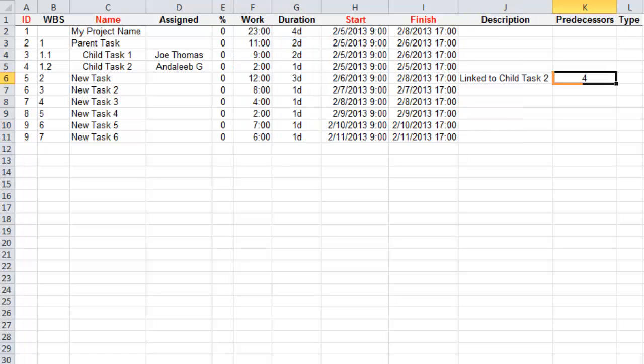If you choose to include a predecessor column, which will define linking between tasks, enter the appropriate ID for the corresponding predecessor task. You can also add a column called Type. This allows you to add the name of the project in the first row with the type of P for project, and all the other rows will have a type of T for task. When the project is imported, it will be named according to the name in row 2, and the actual tasks list will begin with the task in row 3.